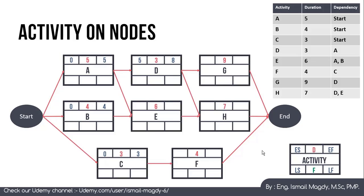Activity E depends on both A and B. A has Early Finish of 5 and B has Early Finish of 4. When an activity depends on multiple predecessors, we take the latest Early Finish as the Early Start — so Early Start of E = 5. With duration of 6, the Early Finish of E = 11. This makes sense because E cannot start until both A and B are complete.